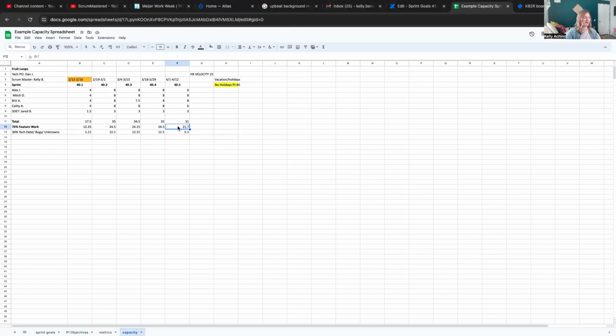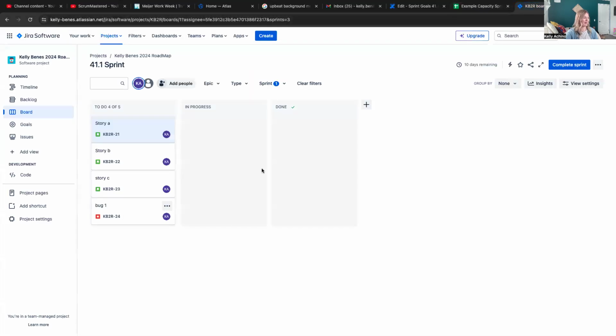So we'll keep that number in the back of our heads, and we're going to leave ourselves an additional 9 points of wiggle room in case anything comes up that we don't anticipate right now that we need to be able to handle during these next 2 weeks. So we're going to plan for 21 points and see how much we can load into our sprint. With that number in mind, we'll bop over to our team and sprint board.